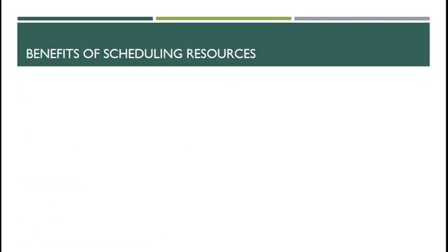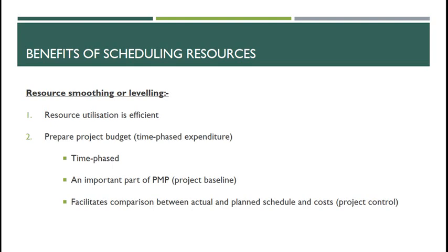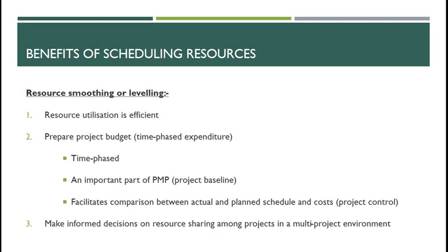So, benefits of scheduling resources. Resource utilisation is efficient, and it helps prepare the project budget. You have a time-phased expenditure. It's an important part of the project management plan and the baseline, and facilitates comparison between actual and planned schedule and cost. And it allows you, as I've just touched on, to make informed decisions on resource sharing among projects in a multi-project environment. So you can do various trade-offs, and you can work out when best to use the particular resources, so it has an impact at programme and portfolio level.